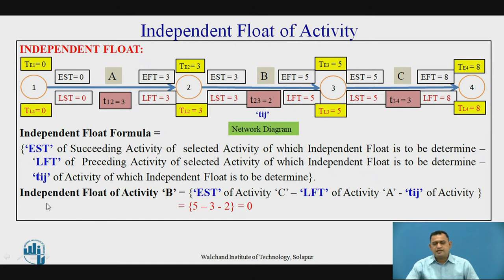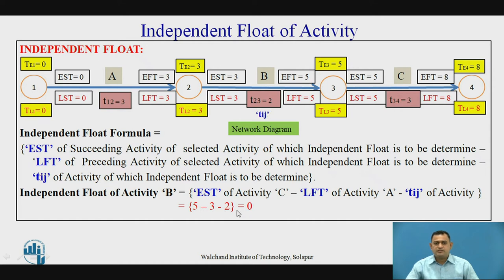Let's see the example for independent float of activity B. The succeeding activity is C, and EST of activity C is 5. The preceding activity of B is A, and LFT of activity A is 3. The activity duration of B is 2. So independent float = 5 minus 3 minus 2, which equals 0. In this way we can determine the independent float for activity C and activity A as well.